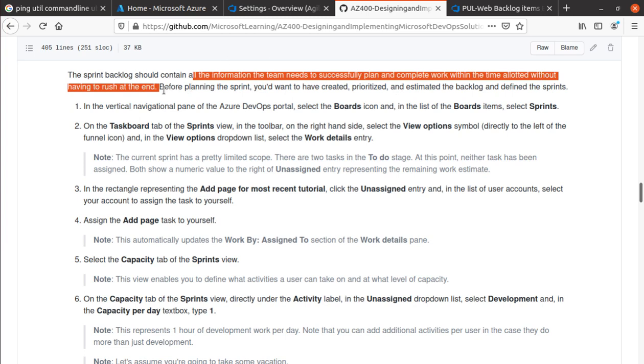It's easy to read and write, but a lot of times it's difficult to figure out the exact nature of the work. If you create a story and it's really broad, and you're thinking maybe it's going to take me a month, that's probably a really broad story, and you probably need to break it out into smaller parts. The smaller stories that you have are better. Saying this is a small portion of a larger feature and I can complete this in 2 days, 3 days, is better than saying I'm going to complete it in 2 weeks.